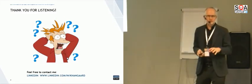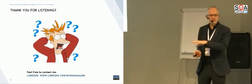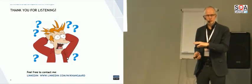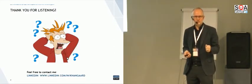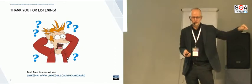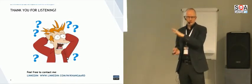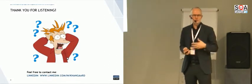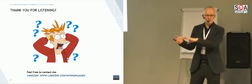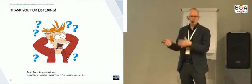But what we try to do is that on these test reports, user stories, whatever, we document everything into a Team Foundation Server. Also, all communication. It's very important that you don't use mail for communicating, because a mail will only be seen by that tester and maybe that developer. So we are very much focused on putting everything into the user stories and the bug reports, so everybody can see. If some Indian people come in early and discuss something, we cannot see unless it's in TFS. But in that way we can have the same information in Denmark. So share the knowledge, it's very important.